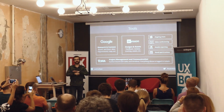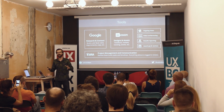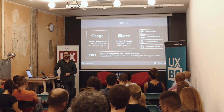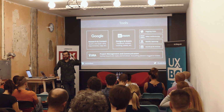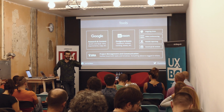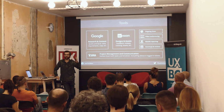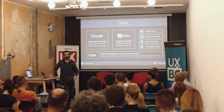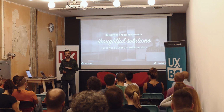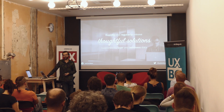So if you want to understand what is happening with an entire project, all you got to do is go to its unique Jira ticket or Epic or whatever, depending on the scale of project that you're looking at. So we create a Jira ticket for each project, and then we break it out by tasks: this is what each team is going to do, these are the specific things they're doing, put that on a Kanban board, and it's really easy to understand where everybody is at in the process, what kind of progress they're making, and what's coming next.